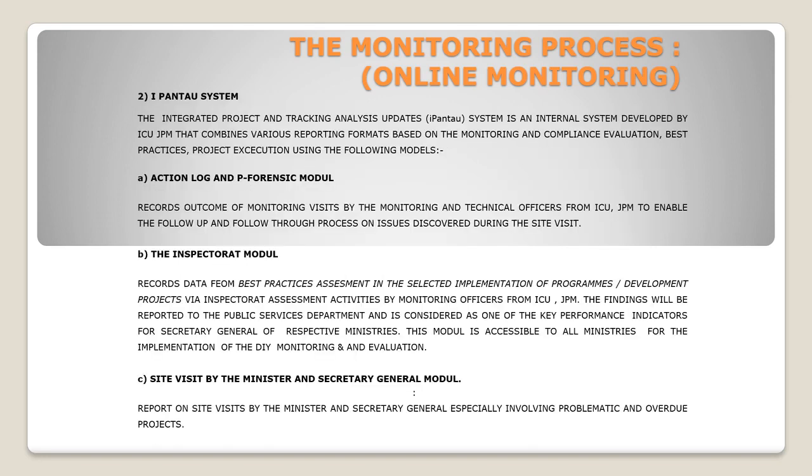The monitoring process. Online monitoring. iPantau system, the integrated project and tracking analysis updates. iPantau system is an internal system developed by ICU JPM that combines various reporting formats based on the monitoring and compliance evaluation best practices project execution using the following modules: A. Action log and P forensic module. Records outcome of monitoring visits by the monitoring and technical officers from ICU JPM to enable the follow-up and follow-through process on issues discovered during the site visit.